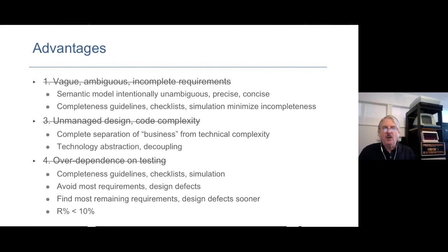I mentioned that rework percentage. On typical projects, it's about 61, 62%. 61, 62 out of every 100 labor hours on the project is fixing things that were broken earlier. But on model-based projects, we can estimate, based on experience, not precisely captured data, and I'm willing to bet large substantial amounts of money, that the rework percent on these model-based projects is under 10%, probably on the order of 7.5% is a reasonable estimate.